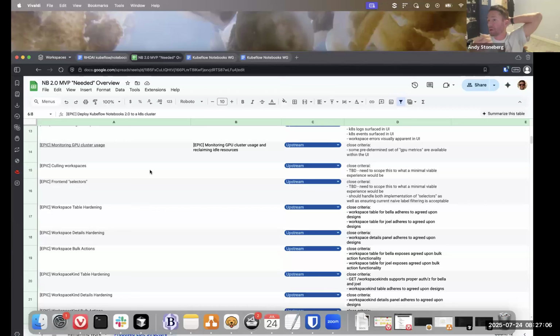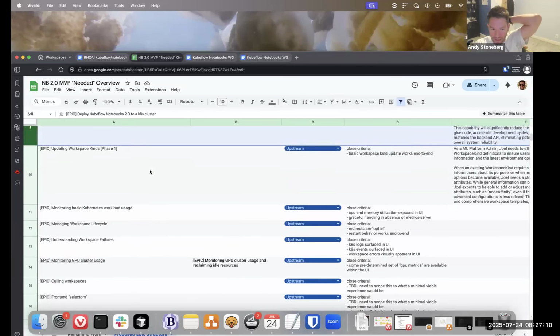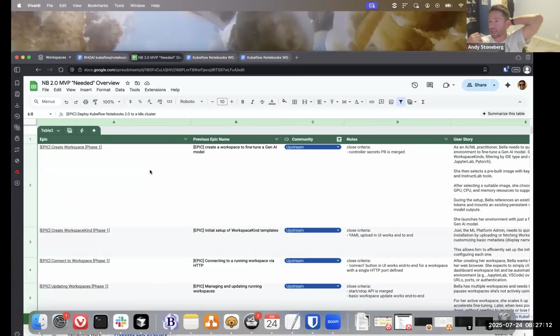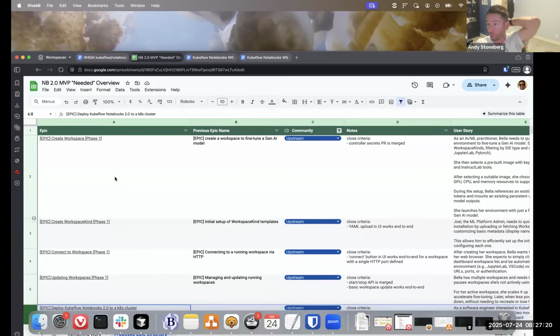The other great observation, the other thing that's quasi controversial that I did here is, because it's getting confusing, I don't think long-running epics are helping us right now, and that can absolutely be a controversial point. So there are more of these epics because I'm trying to align them much tighter to significant features, because it's getting difficult with these expansive long-running epics. When is it closed or not?